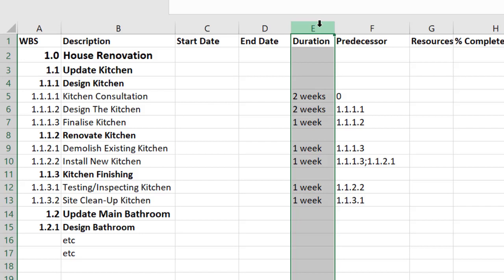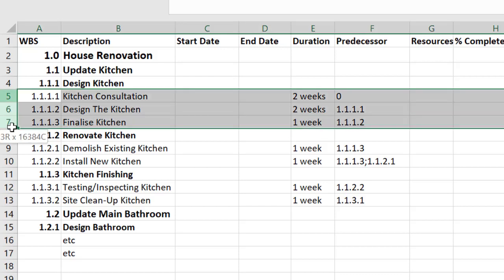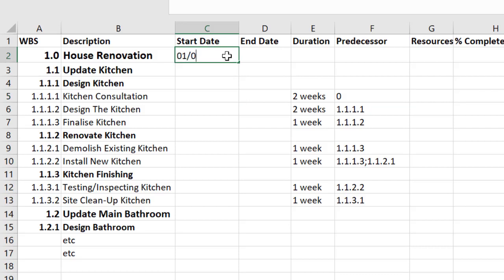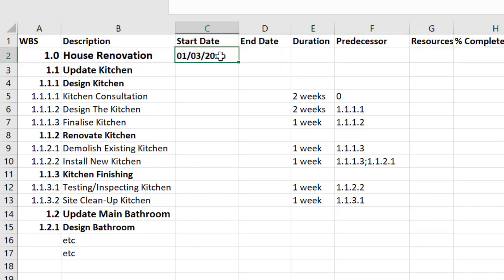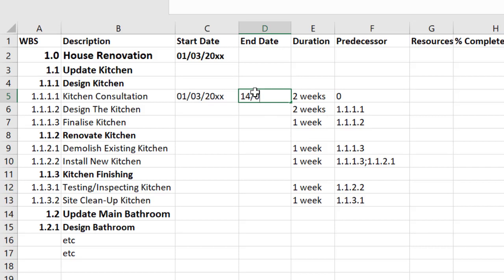So once we have E and F completed it's really easy to do start date end date and once again we start only at this lower level because it's going to roll up to the top. So kitchen consultation already we said there's no predecessor it can start on day one. Now I happen to have been given a start date for this project and it's the 1st of March. I'm just going to bold that so it stands out. So you may not have been given a start date. If you haven't you'd have to work back from a deadline all the way back through and figure out your start date from there. But in this instance I've been given 1st of March and I'm going to work with that. So I know that the kitchen consultation can be done on the 1st of March because there's no predecessor and it's going to take two weeks. So that's going to finish on the 14th.